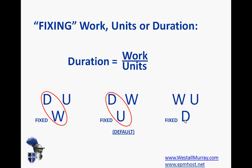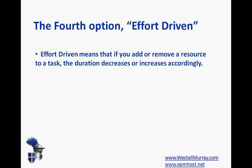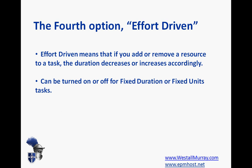The third option is to fix the duration. If duration is fixed and we change units, then work is going to change. If duration is fixed and we change work, then units are going to change. If we override and force the duration to change, it's going to be work that changes. The fourth option — effort-driven — simply means that if we add or remove a resource to a task, the duration decreases or increases accordingly. We can turn that on or off for fixed duration or fixed unit tasks, but in the case of fixed work, we cannot turn it off — because effort-driven is essentially like fixed work; the two are very closely related. And remember that by default, all tasks are fixed units and effort-driven.